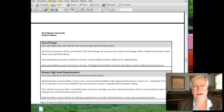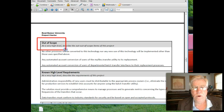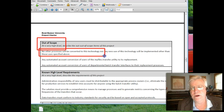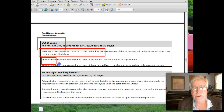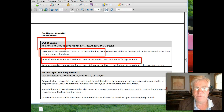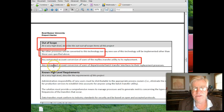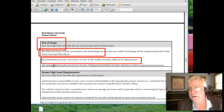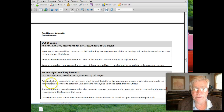We also had to define what was out of scope — the things we weren't going to do. No processes beyond the list of 16, and we weren't going to automatically convert anything from the old ad hoc system. We set up a list of things we weren't going to do so we didn't get questioned later about why we didn't do them.